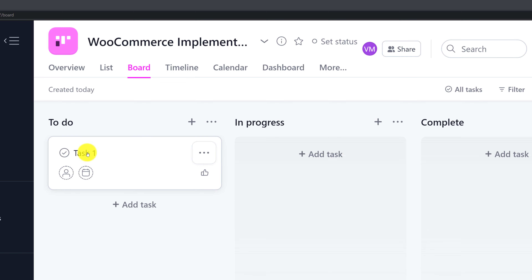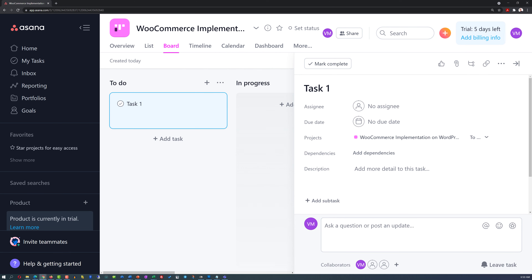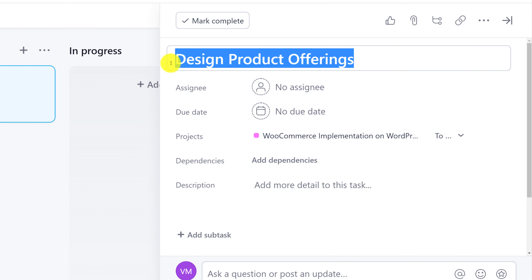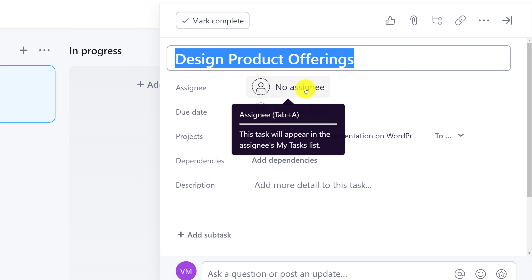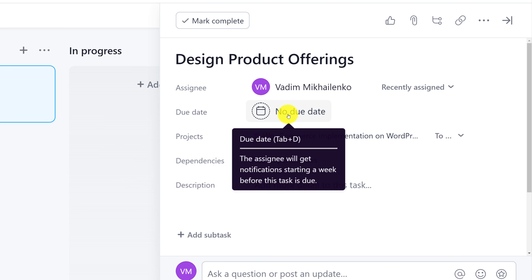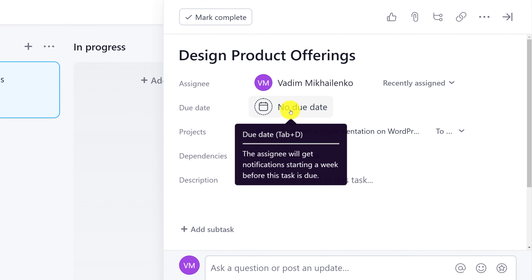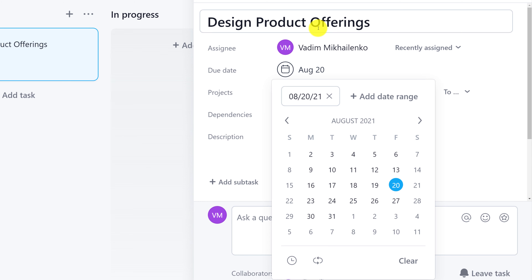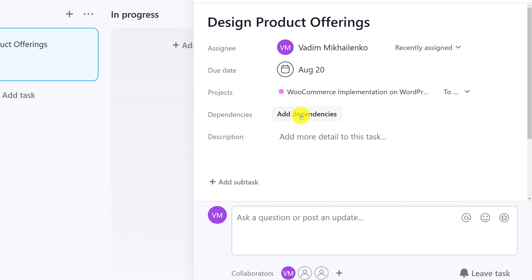Let's see what we can do with task one. I'm going to click on task one and make necessary updates. Because my project is to build an e-commerce store, the main task here is to design product offerings — to actually design what I'm going to be selling. I need to assign it to somebody, and in my case I'm just going to assign it to myself. I will also benefit from setting up a due date, because a project is something that has an end date. I'm going to pick July 20th. This gives me time to build the product offerings for my e-commerce store.